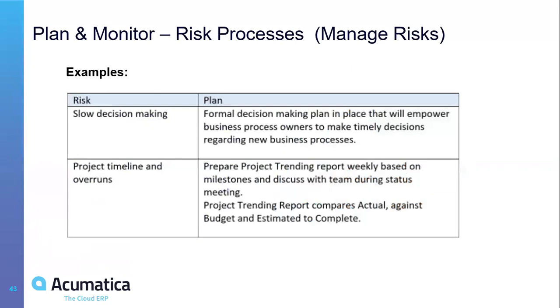Try to, from the beginning, identify what kind of risks there are in the projects, how you deal with them, and how you can avoid them even happening. Like I said, the best solution is to avoid it coming up, right? Maybe set the expectation and say, if you don't sign off the design document until next Friday, then we have to postpone the configuration of the solution, which means in the end we have to postpone go live. So try to avoid it from the beginning.